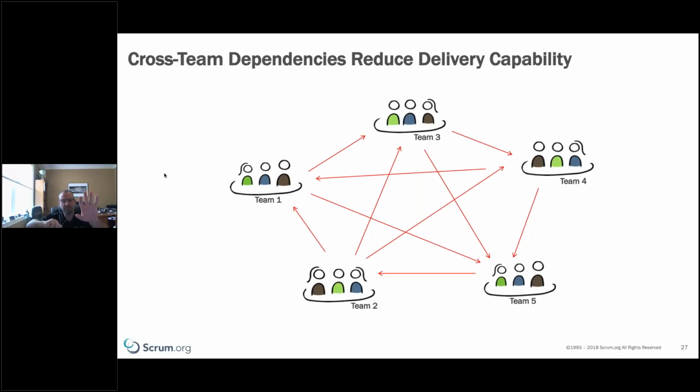If a dependency from team 1 is on team 3, can we pull that capability into team 1 so they can be working in removing that dependency on another team? If not, how do we prioritize that so that the work by team 1 is done so that team 3 can go and keep moving? But also, how does team 3 keep being productive while they're waiting? Not sitting around on their hands, but actually working on things and working across those dependencies. We've all worked in organizations like this. We've all worked on projects and things like this as well.